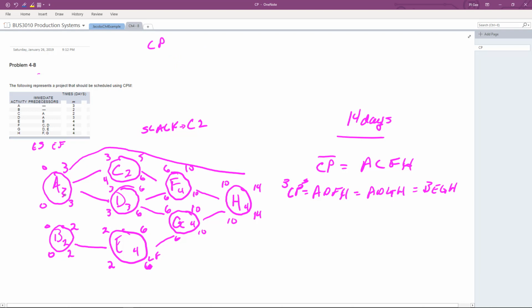Okay, so the next step is what I've whited out here so it wasn't distracting. We're going to say, as a manager, you're managing, let's say, activity F, and that might be putting the visor on the motorcycle helmet, and you know that it takes 4 days to do that. Or in reality, it might be 4 days to do 1,000 helmets or something like that, right? So it's 4 days, but in the real world, we'll say, well, if everything goes right, it might only take us 1 day, and it might take as long as 14 days if everything goes wrong, okay?